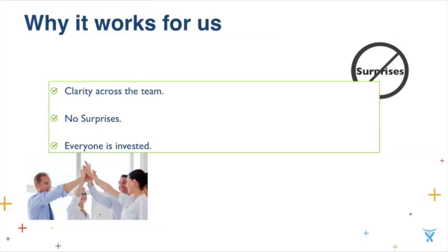So we got all of our stakeholders together, and we explained to them the problem. We said, hey, our launch date's coming up, and you want this one giant 40-point feature, plus you want these 8 smaller features. So we either need to move out the date, or you can have this one 40-point feature, or you can have these 8 smaller features. So rather than having the finger pointing and saying, well, IT didn't do what I wanted, they did what someone else wanted, we left the decision up to them.